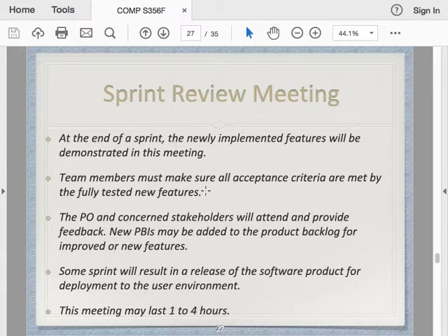But shippable doesn't mean we have to ship it, because imagine if the sprint size is 1 week, and every week the user sees a slightly different product, then it would be a little bit confusing to them. So even though the features are ready, we probably would group several sprints together to release a new version.